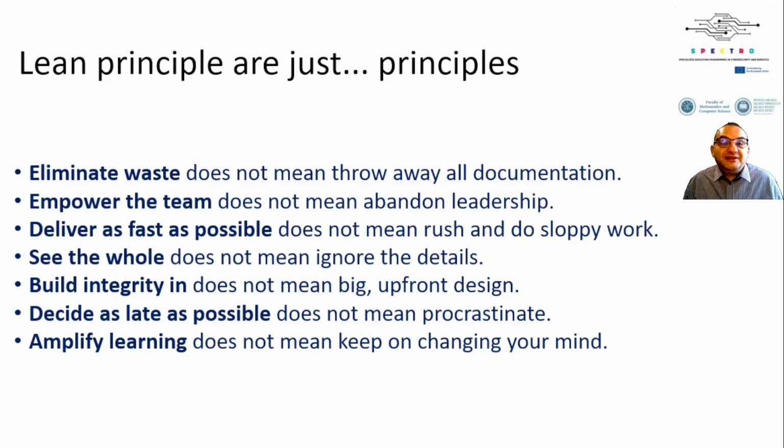For instance, eliminate waste doesn't mean we should discard all documentation. Instead, it means focusing only on documentation that adds value and avoiding unnecessary overhead. Similarly, empower the team doesn't mean we abandon leadership. It's about creating an environment where leadership guides and supports rather than controls.